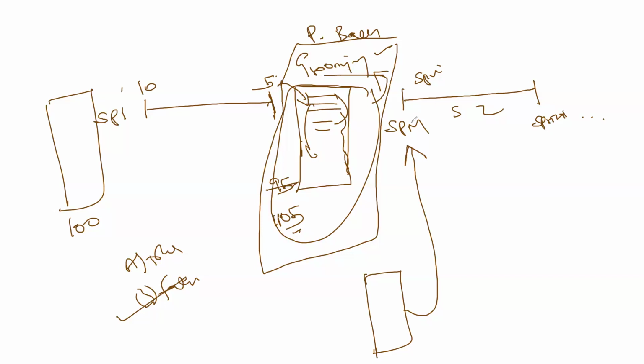So, in the sprint planning meeting of sprint 2, we will fix a sprint goal, right? What goal we are going to achieve, and for that goal, this is the new product backlog. For this goal, what features we have to choose, and if those features are still relevant for sprint 2 goal, we will take them, or there will be additional or other features selected for sprint 2, and the same cycle continues. But in reality, in many cases, what has not been completed in sprint 1 becomes part of sprint 2, though theoretically not necessary.